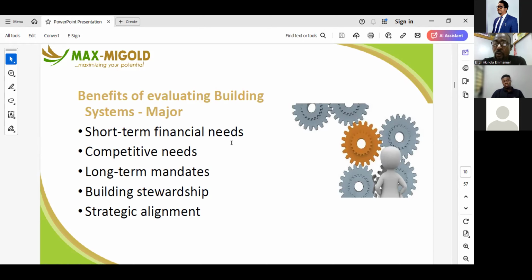Okay, I have the money to replace the floor tiles. I have the money to replace some lighting fittings. I have the money to do some minor painting work. For the complete replacement of the roof, this is becoming a capital expenditure, and I have to wait on whether I have the capital or financial capacity to fund that capital need.